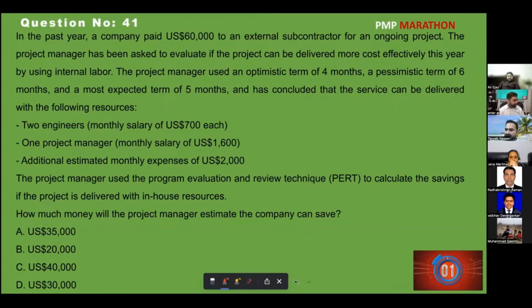A very important question, guys. So how do we solve that? We get three durations. We use PERT: optimistic, four times most likely, pessimistic, divided by 6. The minimum duration is 4 months, that is optimistic. The in-between is most likely plus pessimistic. You will get 5 months.